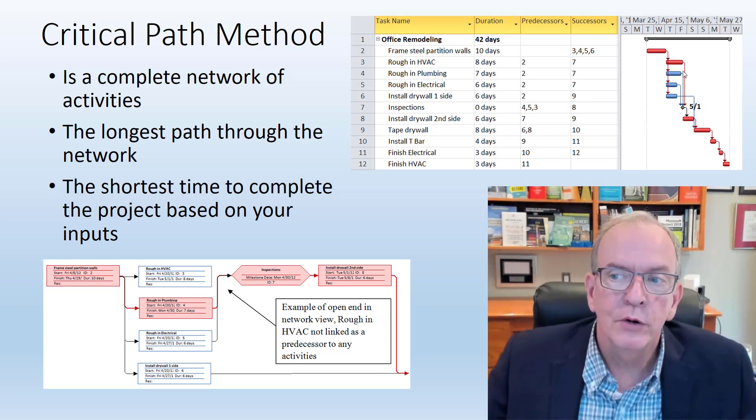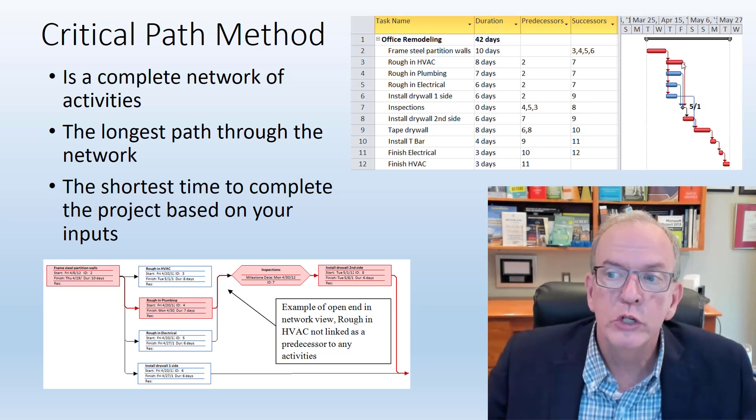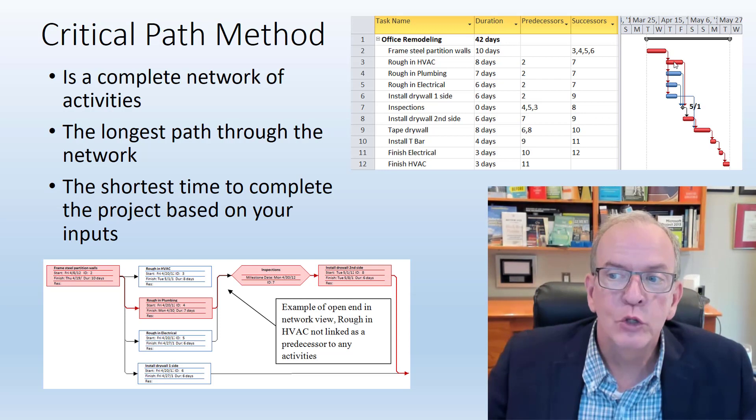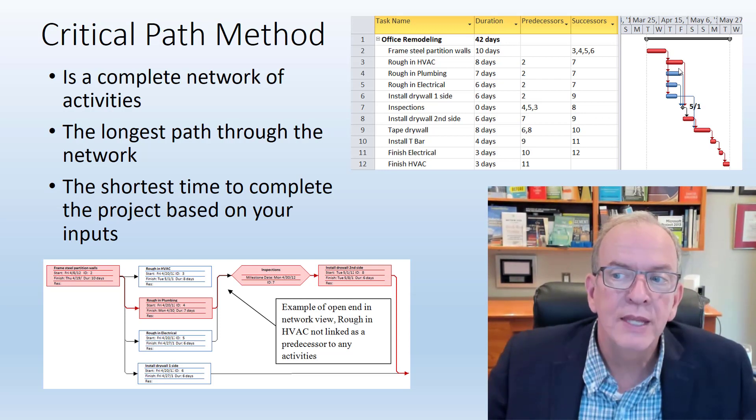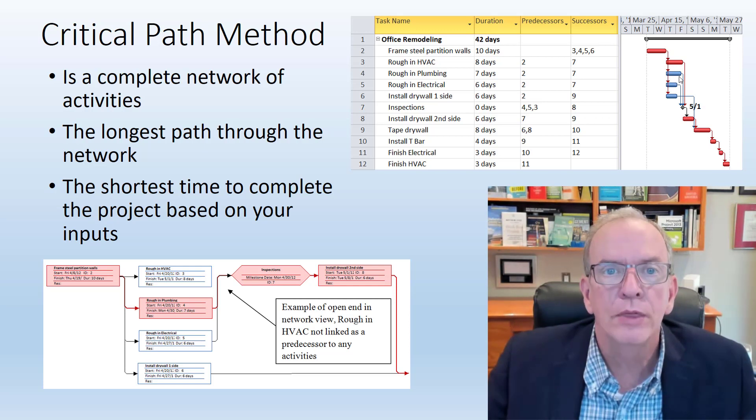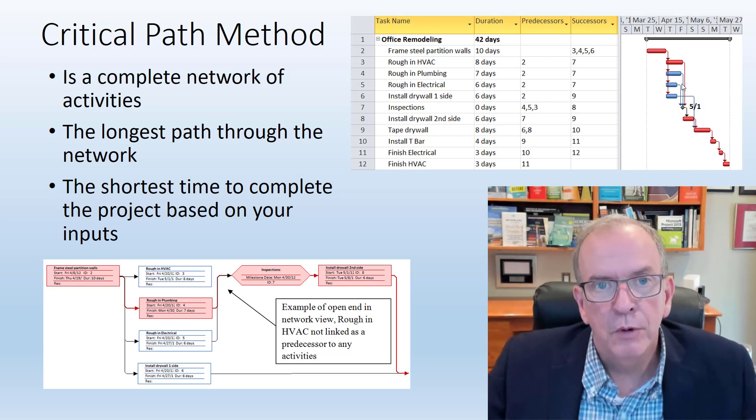Like to my point earlier, I could shorten this by one day, this red item, and it would shorten my project by one day. If I shortened it by two days, it would still only shorten it by one day because this would become critical, because this would now be on the longest path through the network.